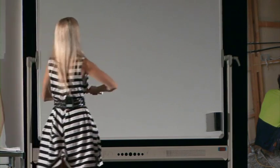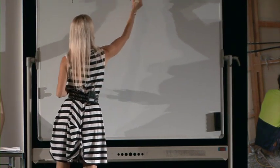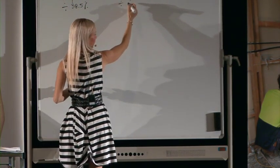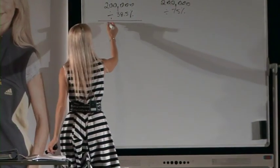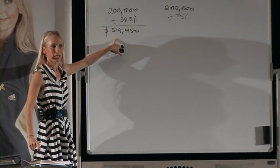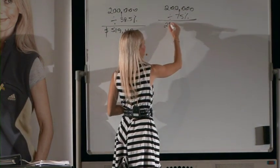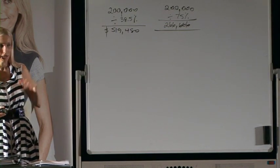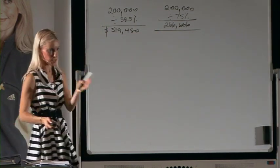Let's do the answers together — $200,000. For a cosmetic renovation, we're dividing it by 38.5%. The answer is $519,480 — which is just $200,000 divided by 38.5%. And for a structural renovation, divided by 75%, we get $266,666. So you can afford to be buying an unrenovated structural property for $266,000, making sure you have enough money to see the deal from start to finish without running out.